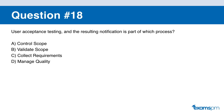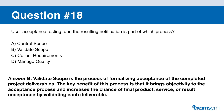Question number eighteen. User acceptance testing and the resulting notification is part of which process? A: control scope. B: validate scope. C: collect requirements. D: manage quality. If you said B, you are correct. The validate scope process is the process of formalizing acceptance of the completed project deliverables. The key benefit is that it brings objectivity to the acceptance process.